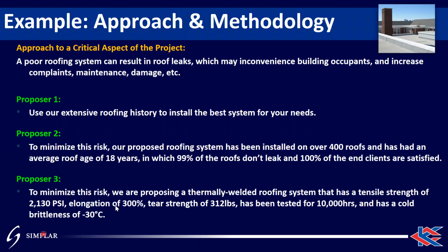But if you think about it, the numbers down here are all inputs. These are kind of technical details as inputs, whereas with proposer 2, one thing I like about this is these are all outputs. These are all results oriented. This is what's actually delivered in terms of value to the client, rather than what's contained within the technical details of a specification, which doesn't really speak to me as a client perhaps.